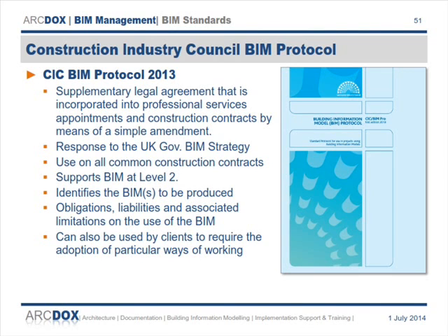Okay. It seems obvious that if you have lots of people inputting information, it's easy to assign liabilities. Yes, absolutely. And one of the things this document does, which is quite important, is it not only defines what your liabilities are, but it also restricts your liabilities to just what you need to do. So people are not coming back and saying, well, actually, you were supposed to do the structural columns as well.